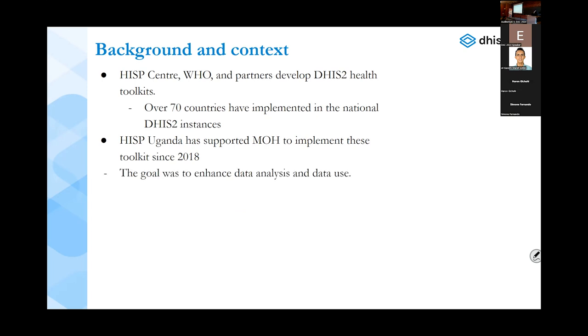And the goal, of course, was that we had a lot of hopes that once we implemented these toolkits and this dashboard version, it would help improve analysis and data use, which was not the case. We realized that in country there was low use of this. People were not aware that we had even set it up, because we set it up without resources to train and get it out to work.